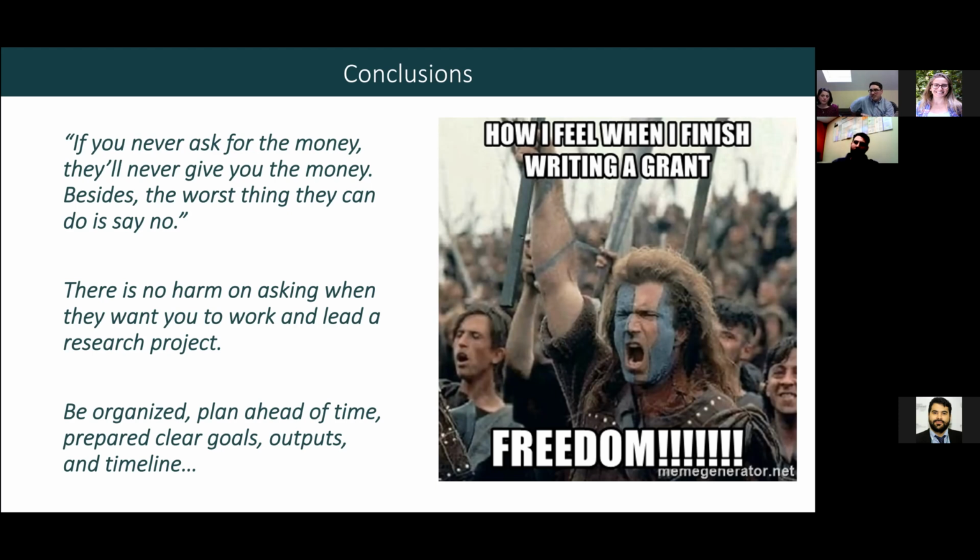But I will always say, make sure not to underestimate the grants and the type of documents that you need, because if you have more external PIs, then you will need more documents. And they need to submit all the documents, and sometimes the documents are many: statement of work, budget justification, budget. So you need to help make sure that they submit everything on time. If not, your grant is not accepted because it's not submitted on time. Because it's not complete. If you don't have all the files that are needed, it's not complete.